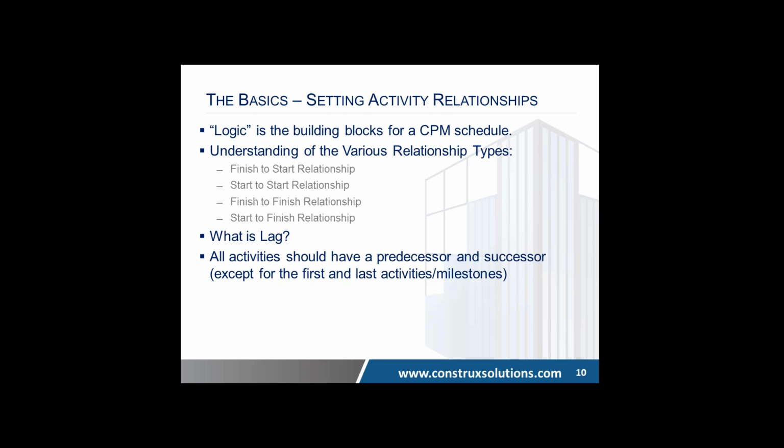Another start to start tie is mechanical, electrical, and plumbing. Perfect example. You don't have to wait till mechanical is done to start electrical. You may want to, but you don't have to in a given room. It also varies on the size of the room.